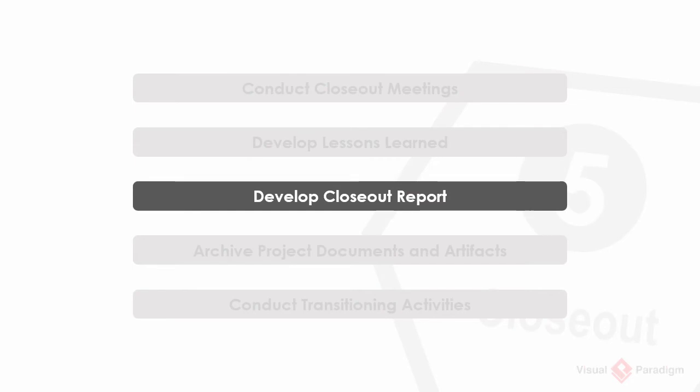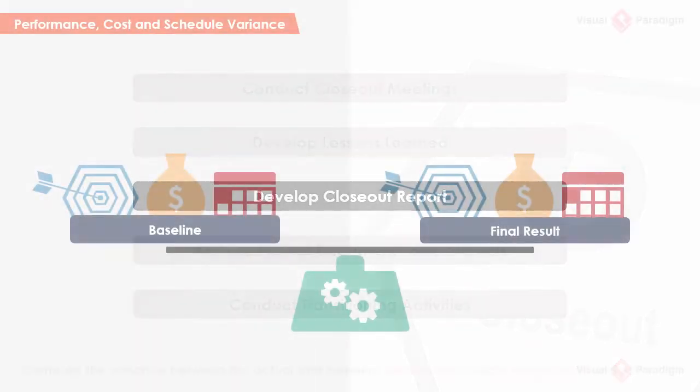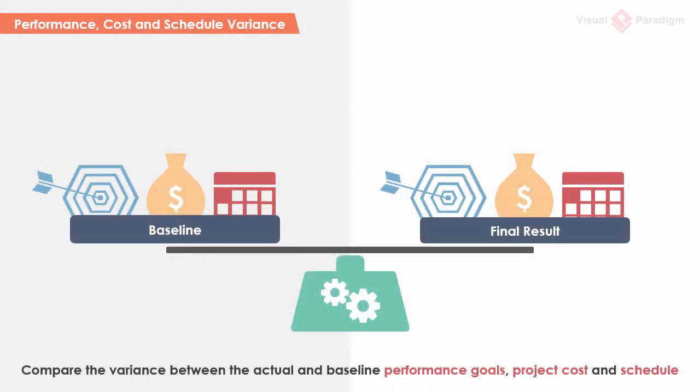Develop closeout reports. The deviation between project result and project plan is inevitable. Part of this activity involves identifying the variances from the baseline plans in terms of project performance, project cost, and schedule. Besides stating the planned and actual figures, it is important to state the variances and, most importantly, an explanation of why such variances exist.